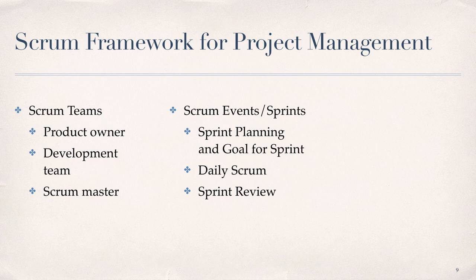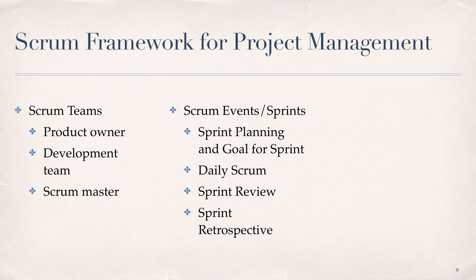Note that we will have a total of 10 sprints in this class, with the final sprint occurring during module 12. The sprint retrospective is an opportunity for the Scrum team to reflect on the work accomplished during the sprint and create a plan for improvements to be enacted during the next sprint. The purpose is to inspect how the last sprint went with regards to people, relationships, process, and tools, to identify major items that went well along with opportunities for improvement, and to create a plan for implementing those improvements. The sprint retrospectives will provide the basis for your individual and group evaluation assignment due at the end of the semester.